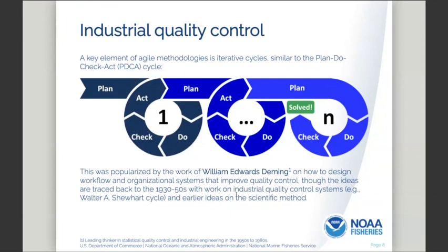It came from others, but he's the one who really popularized it, made it digestible, and taught a lot of workshops on it to industry. And if you search for PDCA cycle, you're going to see this all over. And these are really short learning cycles. And so the idea is you plan what you're going to do, you go do it, and then you check it, you reflect, you study, and then you get better. And then you do it again.